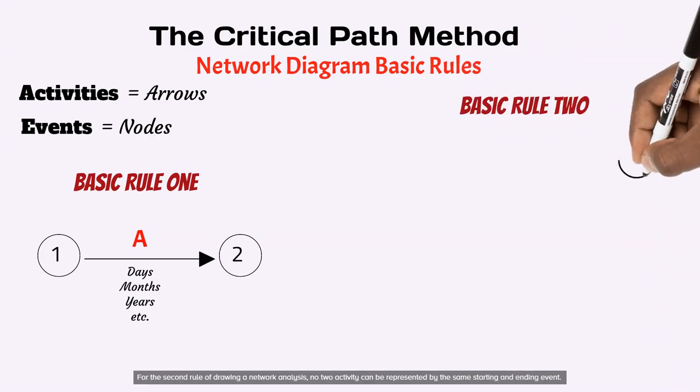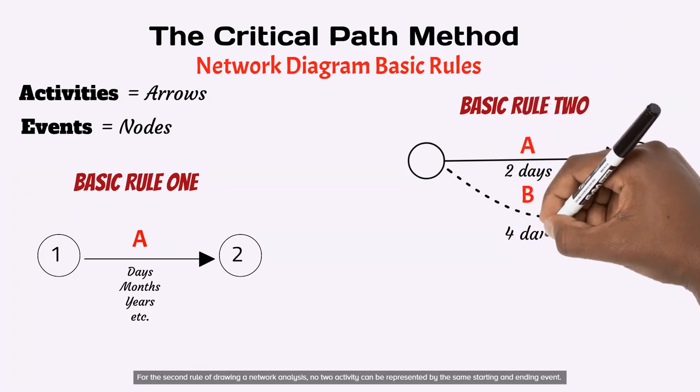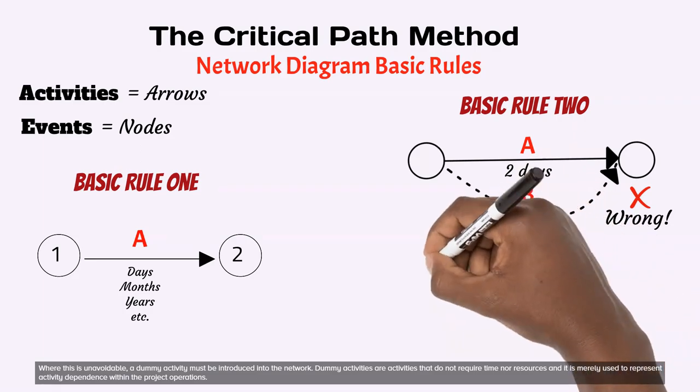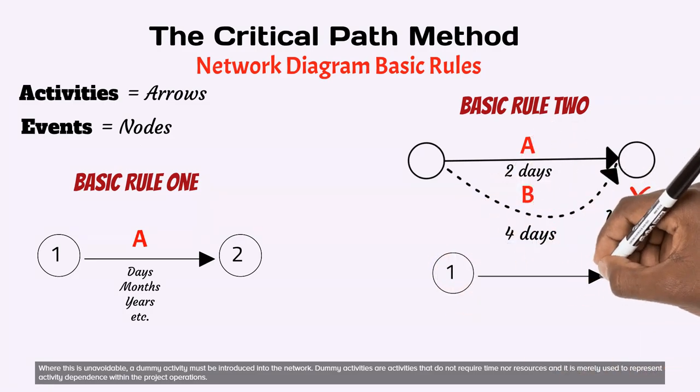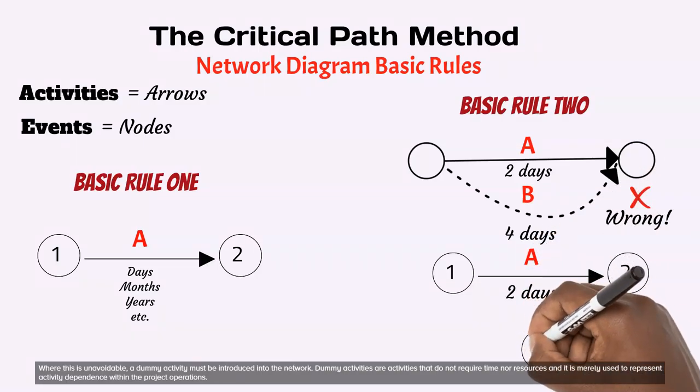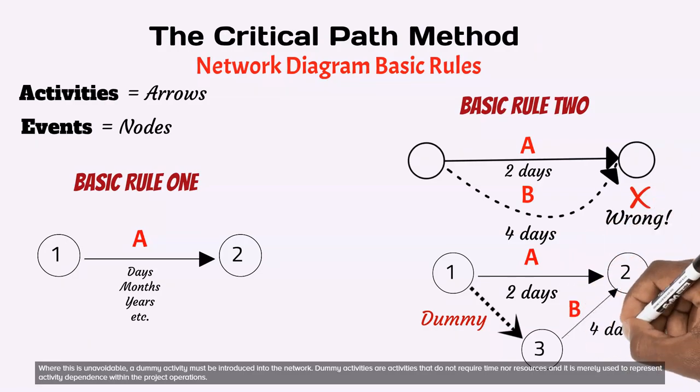For the second rule of drawing a network analysis, no two activities can be represented by the same starting and ending event. Where this is unavoidable, a dummy activity must be introduced into the network. Dummy activities are activities that do not require time nor resources and are merely used to represent activity dependence within the project operations.